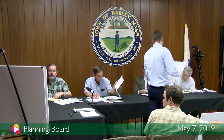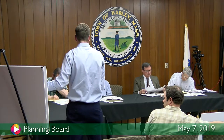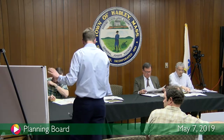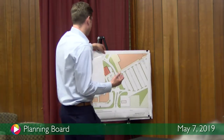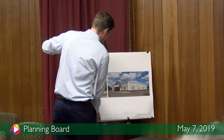The second item I wanted to discuss was the Manny's building, or former Manny's building. With all the work that's going on on Russell Street, we've been getting a lot of action on the property. We do have a lot of interested tenants, and we have a really nice opportunity right now to take that Manny's building and get three tenants. It may end up being two tenants by the time we submit for a building permit. We're requesting tonight a waiver of site plan approval or review, as the goal would be to keep the structure intact. We're not adding any square footage. We're keeping the character that's there. We would really just be updating the building to reflect a more modern storefront and the typical glass that you see today.